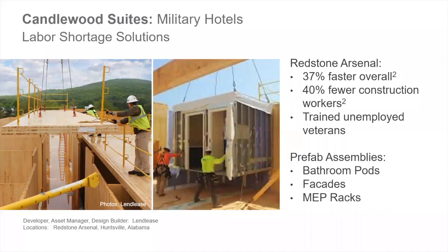I would encourage you to download the Candlewood Suites case study on the woodworks.org website. In this case study, you'll find the mass timber statistics for Lend-Lease's military hotels that compare a mass timber system to a cold-formed stud system. This was an excellent project in that the project was completed about 37% faster with 40% fewer workers on site, and they were able to train veterans who had no prior mass timber experience to install that structure.